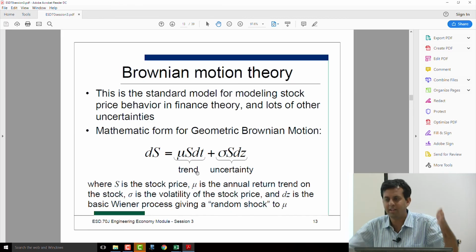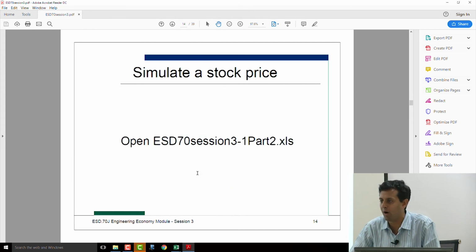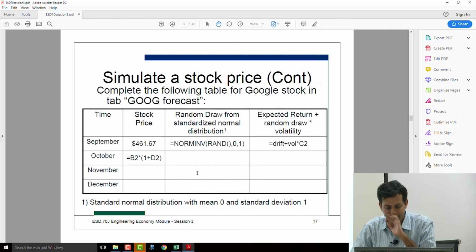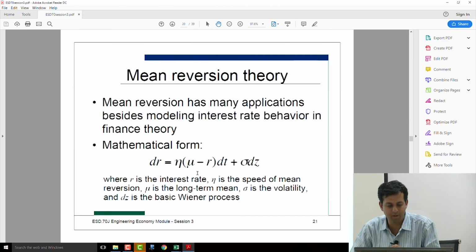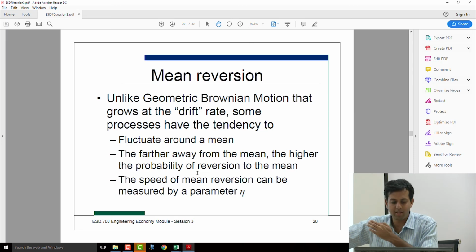It doesn't have to be 300, 600, 900. From that you do some variation. You can take last year's demand, say this is a bit of a trend, and this is some uncertainty surrounding that trend. It might go down, it might go up, etc. And these are used, by the way, to simulate stock prices and so on. There's also reversion to the mean, which means you have this iterative motion where there is constant fluctuation around a mean. That might be another formula.